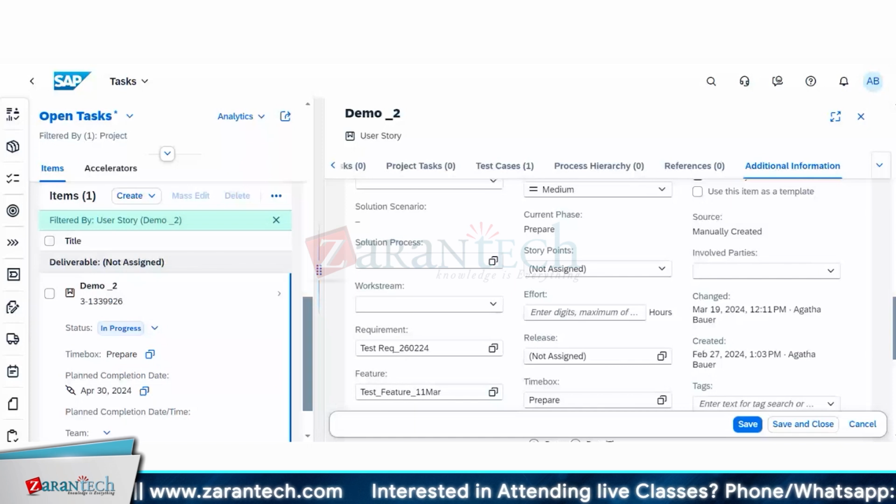They could be external consultants. You might have worked as external contractors, but working on behalf of the customer. So in some cases, they create the requirement, right? So all of this has to be defined: who's going to create the requirement, how the approval process is going to work, naming convention, and which fields we are going to fill up when we are creating a user story or feature, for that matter, a requirement. So all these things we have to decide beforehand, right?